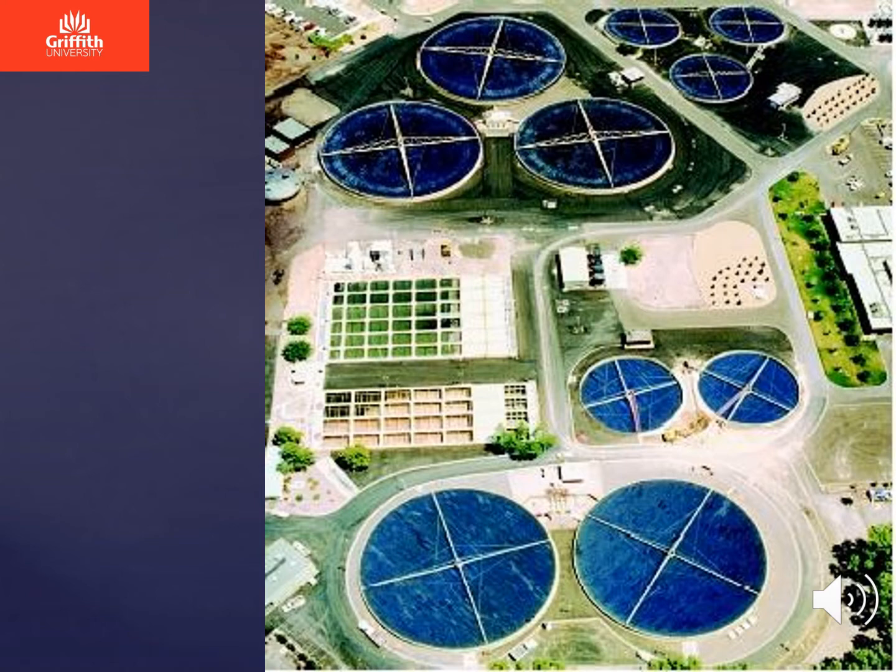And the reason for this uncertainty is that the input, the seawater, is not exactly the same in physical and chemical terms as in other parts of the world. So the same technology may not work in the same way with inputs that are not exactly the same. This is an example of what we call technical complexity.